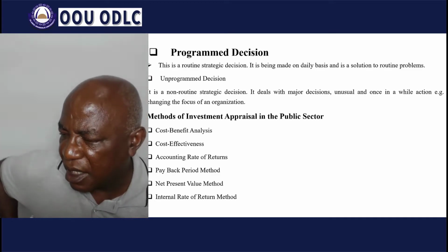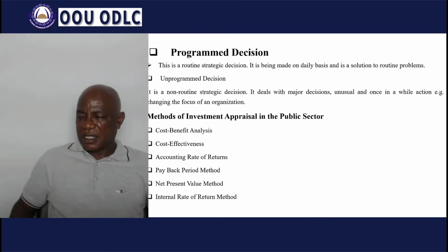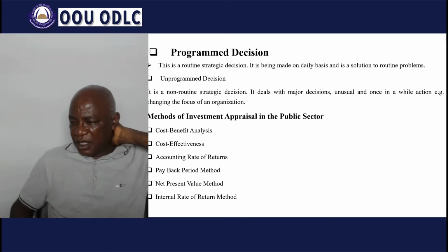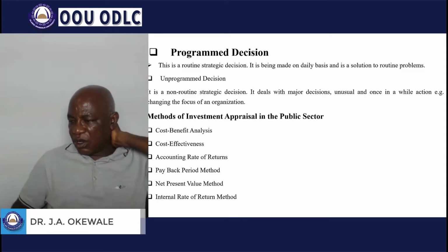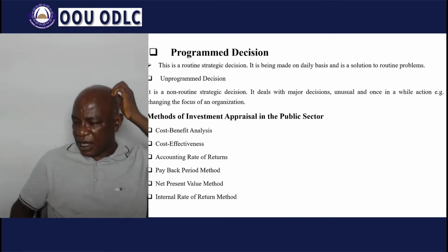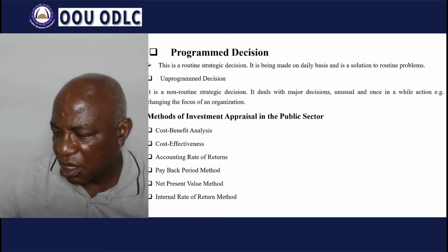Projects are usually undertaken in the public sector via the Ministry of Works. The process is achieved through the means of what we call a competitive tender or a negotiated contract. What do we mean by the two? Under competitive tender, the contractors are to tender for the work to be carried out. They are invited by open tender to the general public, and by the time they submit their quotations, these are negotiated through the tender board process. Such contractors are invited for negotiation and discussion, after which appropriate decisions will be taken.